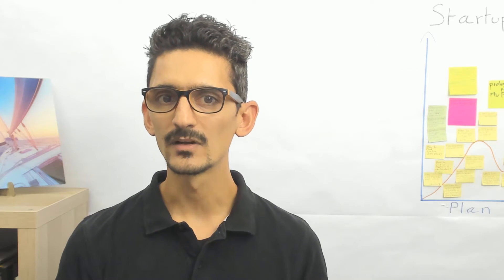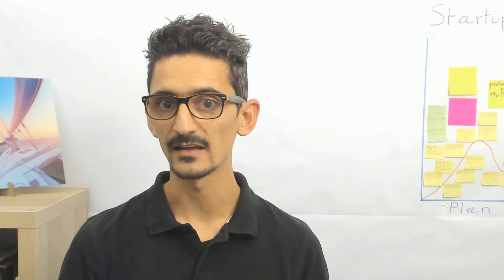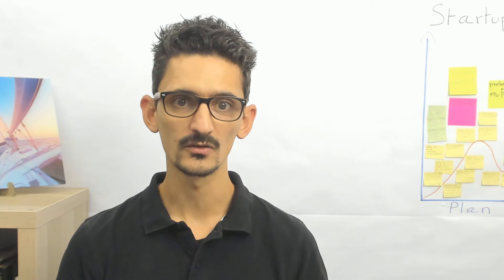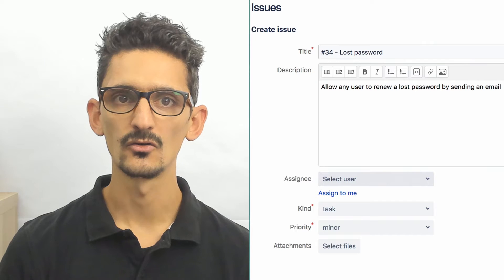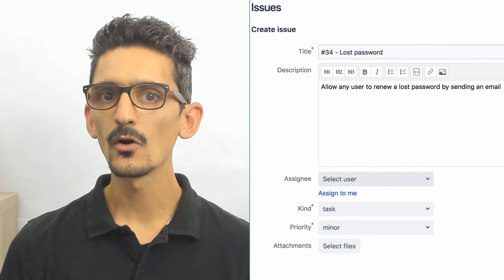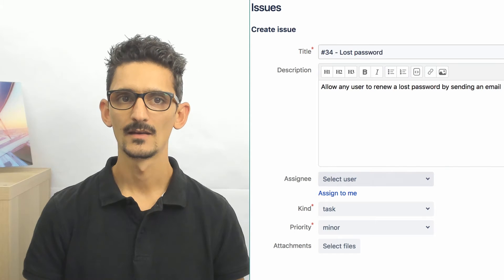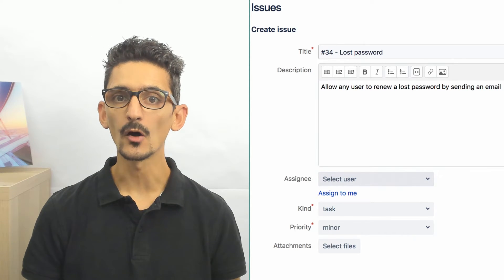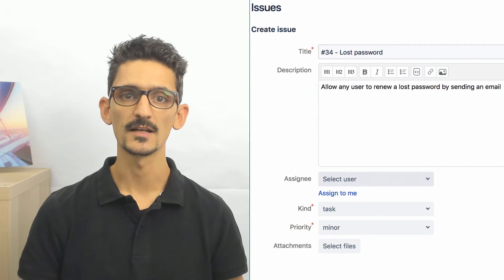This means that to keep better track of things, you can assign numbers to features, like number 34 for the lost password feature. Your developer will add comments in the new code saying that the following new lines of code are to develop feature number 34. Following this methodology, the developer comments will automatically be accessible to the project manager through the project management tool.